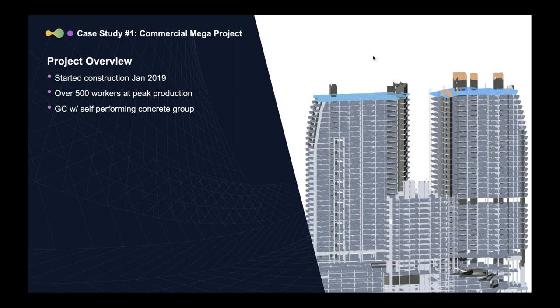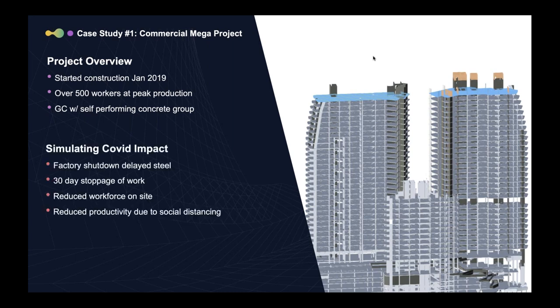So this is a project that started construction in January 2019. At peak production, they're having over 500 workers on the site. And the GC has a self-performing concrete group. So the superstructure is the most high-risk part of the project for them. And they really wanted to ensure to optimize it. They know that once they top out the concrete, they can come in with a pretty strong cadence on the interiors.